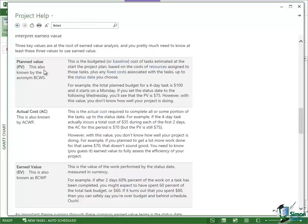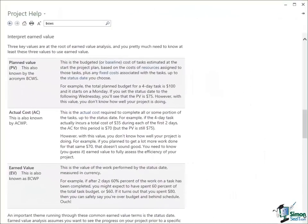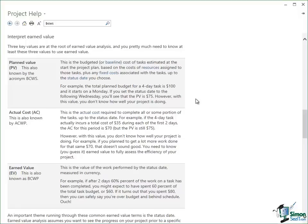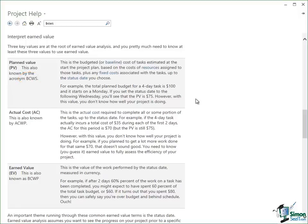Let's start with Planned Value. In explaining these terms I'm going to use the example that they use in the Online Help. They're basically using an example of a four day task which has a total value of $100. When we say a value of $100 that means the cost of performing that task whether it's in terms of materials or work resources or any other costs is $100, $25 per day. If you look at that task at the end of Day 3 of 4, the planned value is $75. If I look at the longer acronym BCWS that's the budgeted cost of the work scheduled which means that according to our plan, according to our budget, at this point in time after Day 3 we should have incurred $75 of cost.